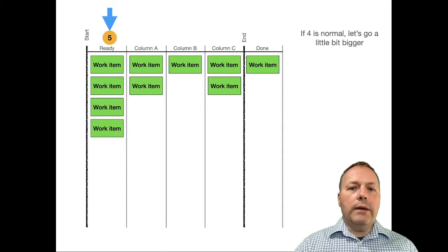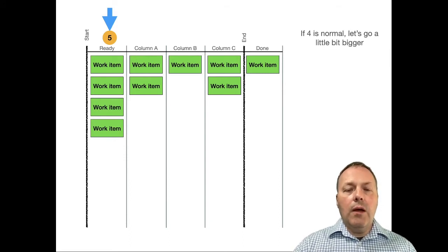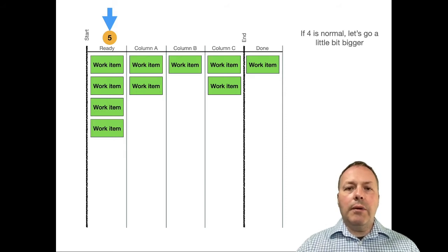And the reason I want it a little bit bigger is because a brand new Kanban team has more than enough to focus on that I don't want them to hit the WIP limits in their first couple of days. Once they get past that stage and they start to get into a routine, yes, then we do want them to be bound by the WIP limits in order to get things done more effectively. But on the first day or two, they've got more than enough to think about. So I like to set the WIP limits just a little bit bigger than they actually need.